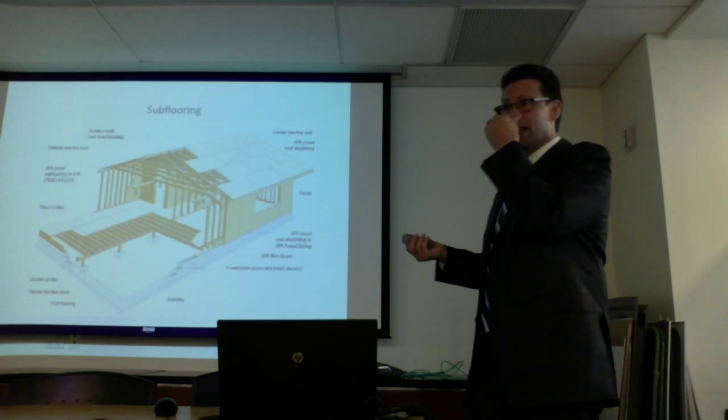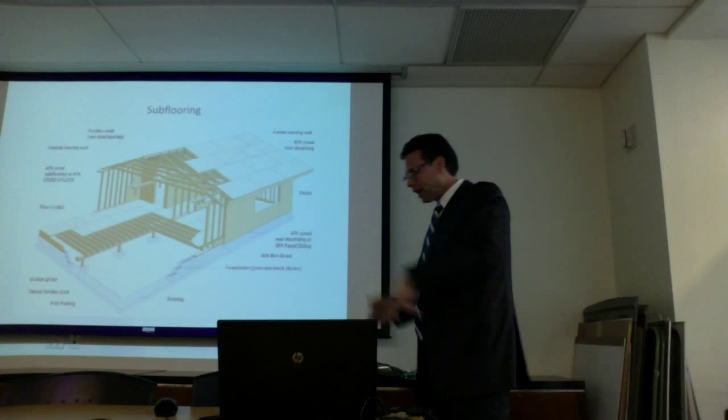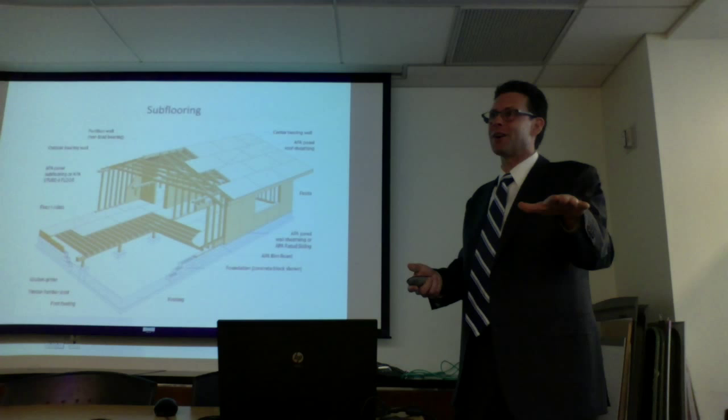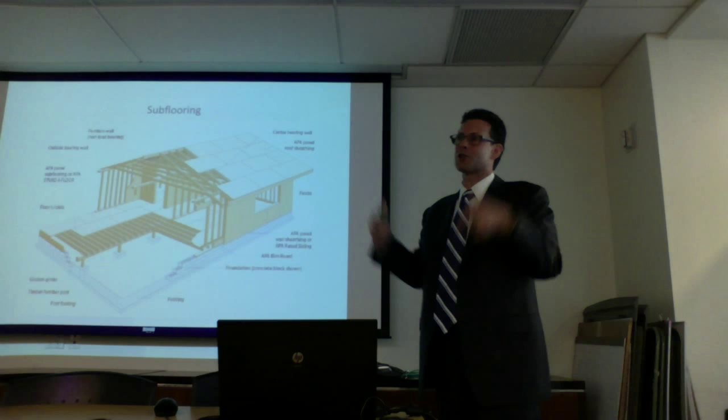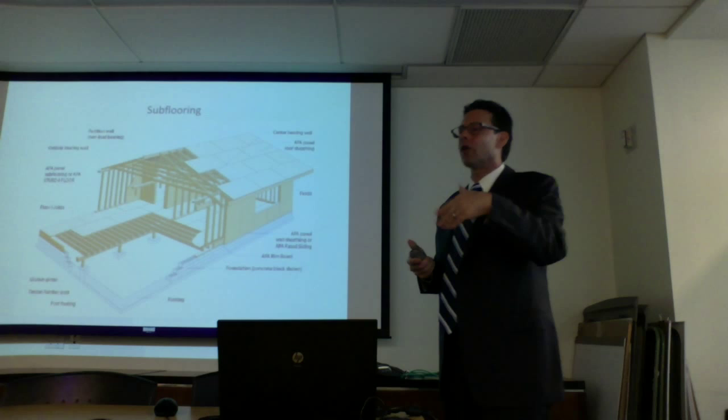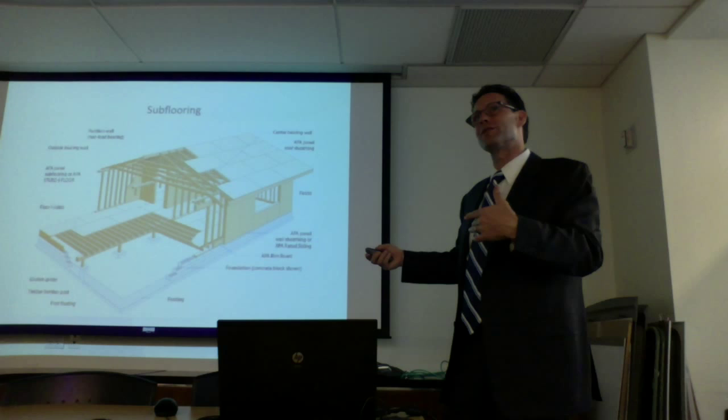We go in, we take both sides of a wall, we put ledger boards, we cut out some of the subfloor, we jack it up from below, we cut the bottom plate out with Sawzalls. Now we have about an inch and a half of room. We take out the subfloor. We slide a new subfloor in. We put a new plate down. We lower it, and we screw those back. We glue and screw that framing back in. Whether it's a 5-foot wall or an 8-foot wall, we still have to do individual walls. So house sizes don't matter as much as the fact that you have to do it.